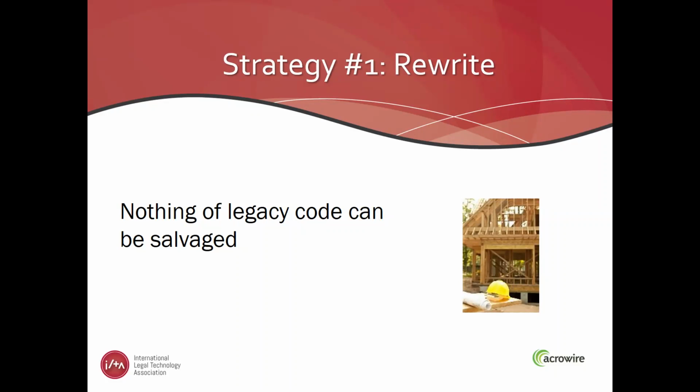How can I prevent the problems we are currently facing, build out for what the future holds, and in effect, build a new house? There is the potential for scope creep and paralysis, though. Once word gets out that this project is being planned, everyone with any stake in the solution, and many with no stake at all, will be telling you what must be included. You run the real risk of creating the software version of a congressional omnibus spending bill, which exceeds both cost and time while not returning the true value you require.